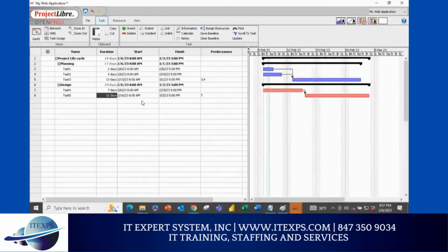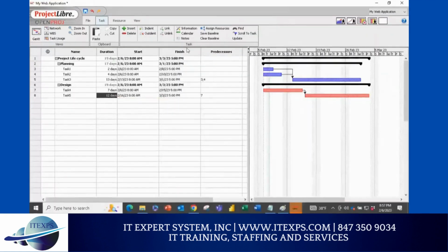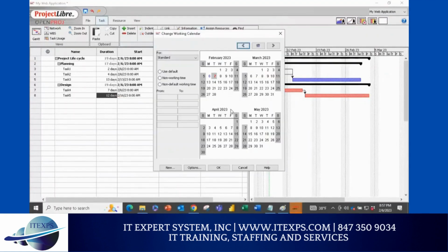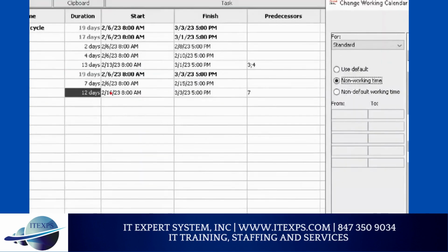But now let me show you here. This guy is working on 2/16 to 3/3, right? So now let's go to the calendar, and I say February 20th, which is this one. I'll say non-working day. So now what? Listen carefully. What will happen? This one started on 16 and ended on 3, and in between there's the 20th, which I said is a non-working day. So this guy will push a little bit further.